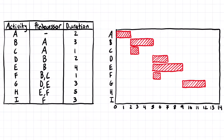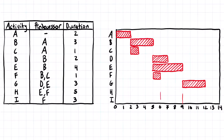Moving on to activity H, H depends on E and F, and it's five days long. So we're going to have to find out where E and F finish. E finishes here at the end of the ninth day, and F finishes here at the end of the sixth day. We can't start H until both of those are complete, and it's five days long, so we're going to start here and go across five days.